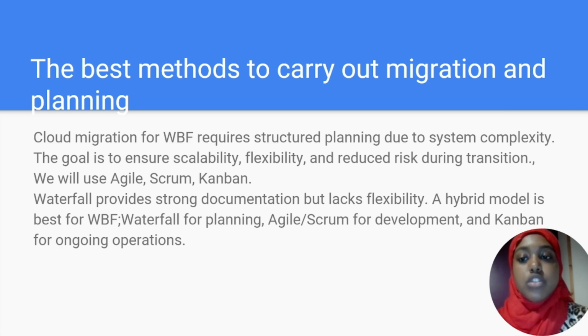However, the waterfall methodology uses a sequential structure where there are clearly defined phases such as requirements and designs, and these phases need to be complete before moving on to the next. While this approach provides strong documentation, it's harder to adapt to changes, making it an inappropriate planning tool for complex systems as it has flexible requirements and is consistently changing. This shows that when selecting appropriate methodology, we need to consider factors such as system complexity and regulatory requirements.